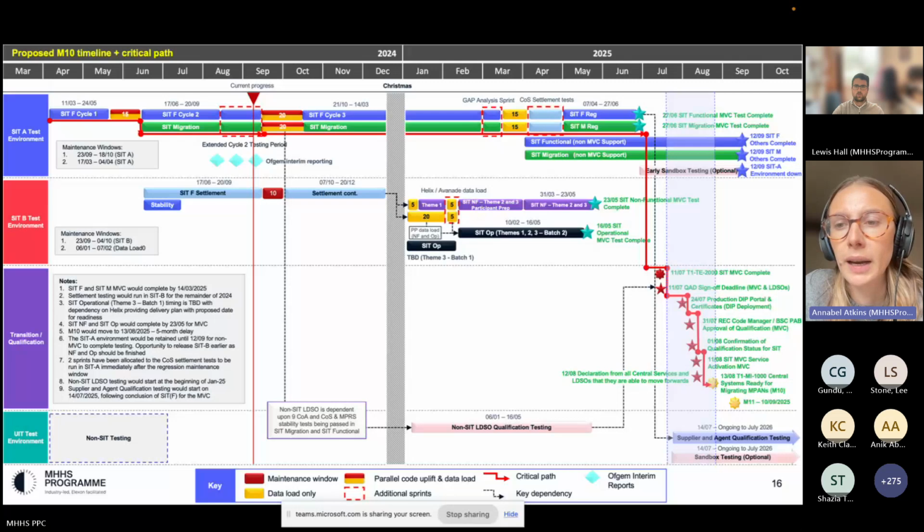Cool. And a question from Jenny: how does this impact the final implementation date? Again, the assumption in the detailed plan is that the timelines will all shift in accordance with this critical path timeline here. So M11 is obviously tied to M15. If M11 is shifting by 5 months, M15 will shift by 5 months. M16 is then scheduled 2 months after M15, so that would move again, 2 months after M15. So at the moment, the assumption is the downstream logic all remains the same. The timelines and windows all remain the same, so everything would shift effectively to the right by 5 months.